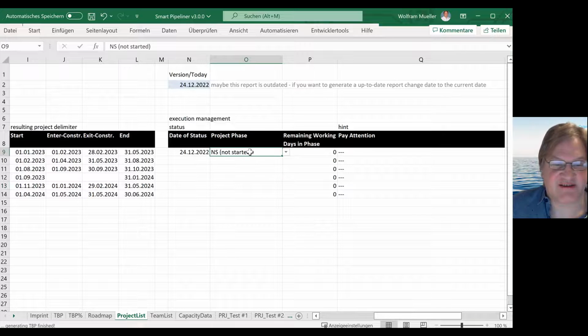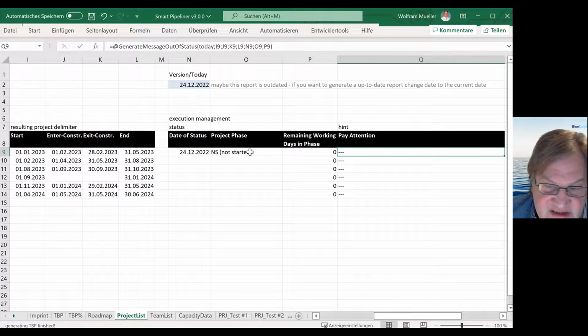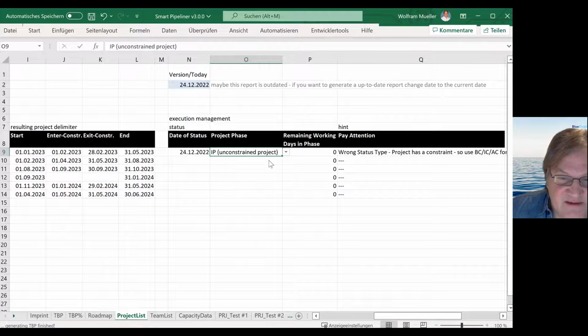So maybe the project manager says, okay, it's Christmas Eve, I did not start. And that's fine. He did not have to be started. So you will see here no hint at all. But maybe he says, okay, hey, I started already, and he selects in progress. And in progress is meant for projects without a constraint. So you will get the message, oh, sorry, you have a constraint, so please use the more specific statuses for projects with constraint.